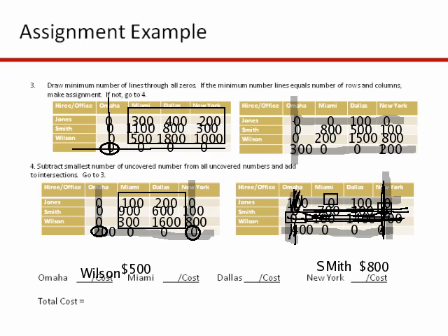All right, so here it is. This row has only 1 zero now. So we're going to send Jones to Miami, and that is going to cost us $1,100. Okay. So Jones to Miami is going to cost us $1,100. And then we cross off Jones, and then again we're left with the dummy. So then nobody is going to go to Dallas. Basically, we'll assign the dummy to Dallas.